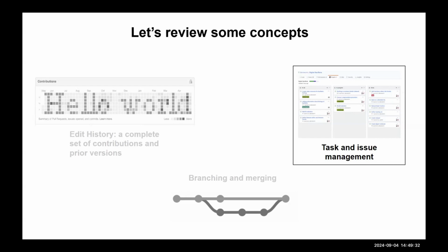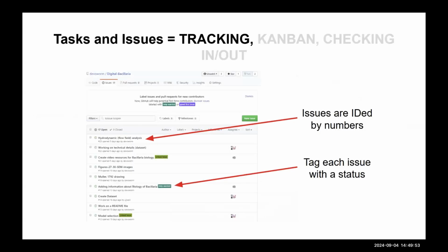But basically, these issues are going to be central to working in teams because they take the to-do things that you need, enumerate them, make them salient, and then you can reference them when, say, you're making a pull request. So it'll create this list of issues. If I'm on a team and we have a meeting, we'll decide that we need a bunch of things, we need action items. Those action items can then be entered as issues.